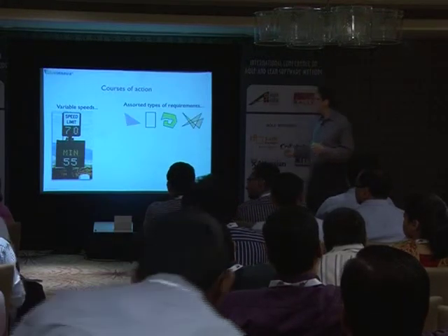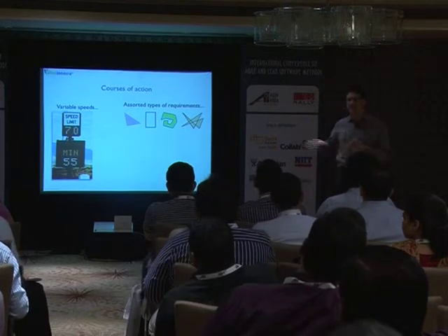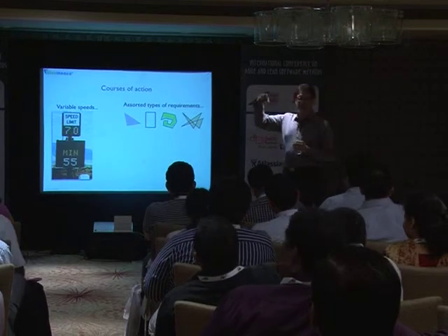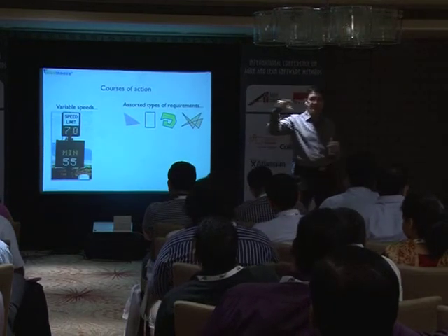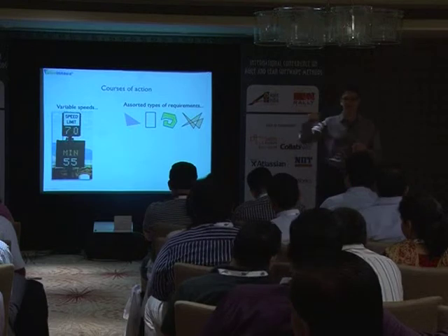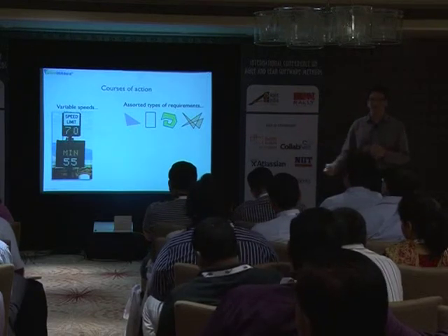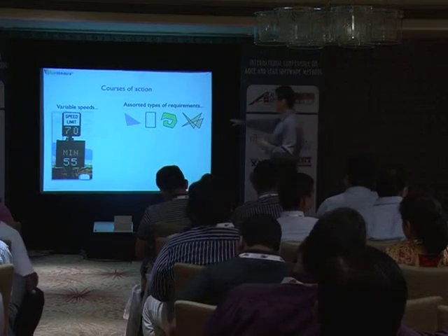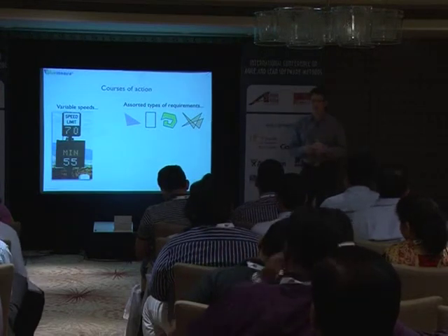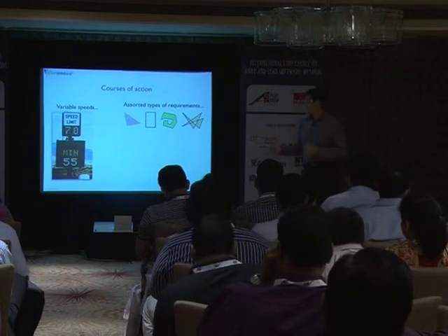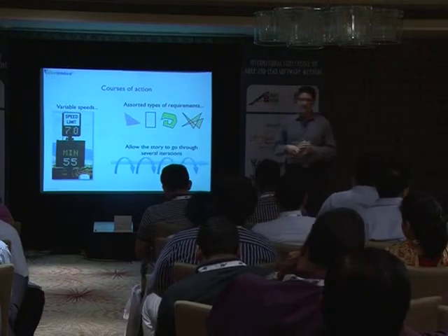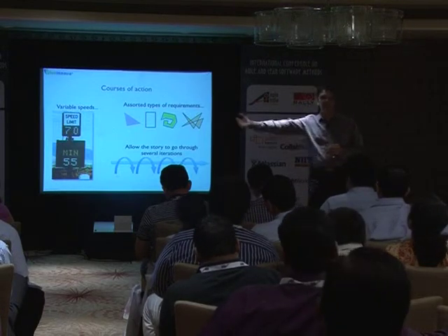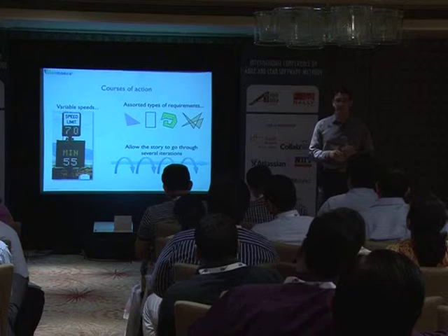Another strategy has to do with generating different kinds of requirements. So then we say, okay, this kind of requirement always has to fit within a sprint. This other one is okay if it takes 2 sprints and so on. So we start bringing some sort of flexibility, but with discipline. And one way to do it is just we classify different kinds of requirements. So that's another strategy. And another one is what I mentioned. We can just say, let's leave this story to bleed to the next sprint, okay?